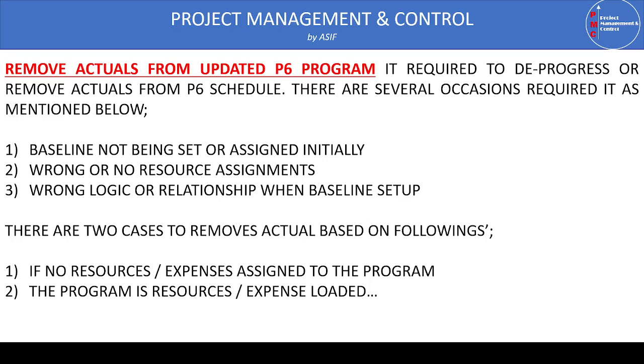In this case, because the project had already started based on the drawings, we established the program of the works and assigned the weightage factor based on our assumptions to monitor the progress. Once the contract is finalized and the BOQ is done, we revise the program again and put the BOQ costs and resources accordingly. After this, when we need to determine the payment for the contractor, we need to update the approved baseline program for the past months which have already passed.